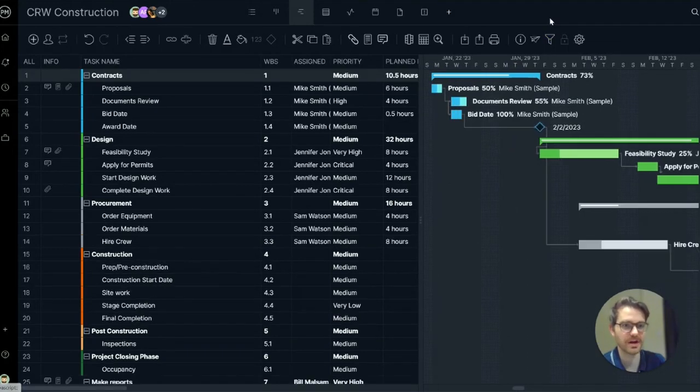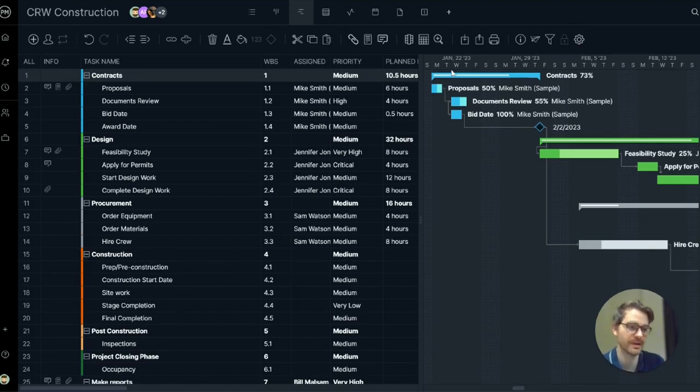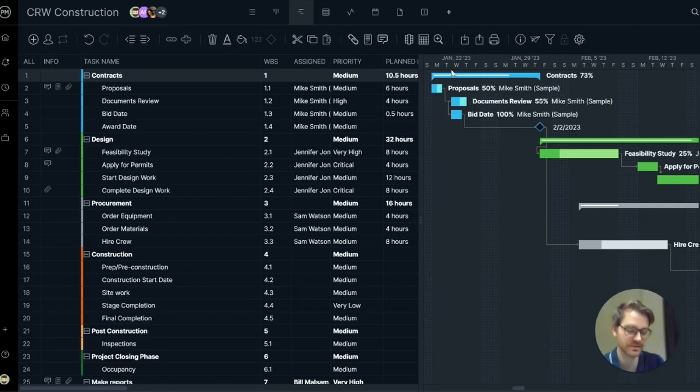Understanding the critical path is all about establishing dependencies. Project Manager offers four different task dependency types for the Gantt chart: start to start, start to finish, finish to finish, and finish to start.